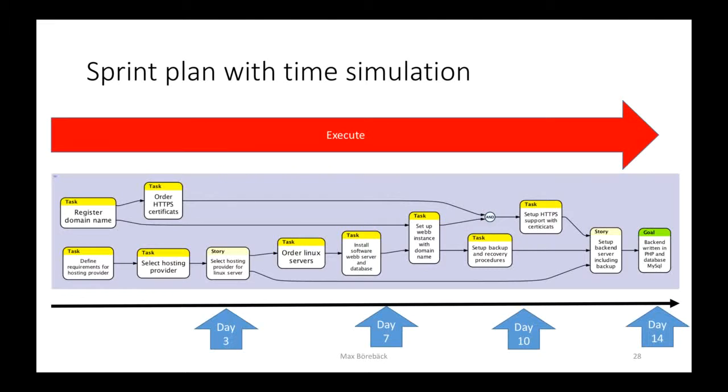This is a good thing, as we can then communicate this to the product owner. The product owner can also see this time simulation and see how complex it has been. Also when you do this breakdown, you can escalate things to the product owner saying, this is more complex than we were thinking, so we don't believe that we can deliver everything in this sprint. Is there anything we should take off? Or you might divide it into a sub-story, or decide to leave out some of the less important things, for example. This is a very good way, and you can also use the traffic light here and highlight things while you are doing your sprint.